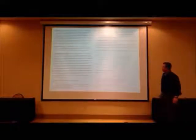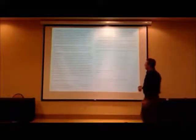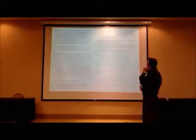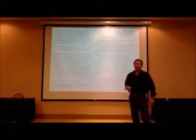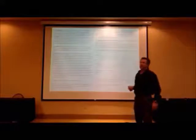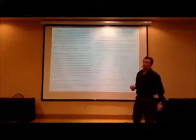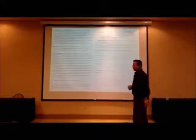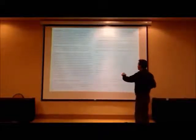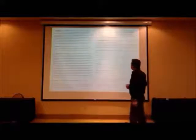The warranty, that he's gonna warrant his work for 1 year. And there is an arbitration clause in there that if you do get in a dispute with the contractor, he agrees to arbitrate, which is a lot less costly than going to expensive litigation. Time is of the essence. Kaboom, baby, thank you. Time is of the essence of this agreement, and it's the entire agreement.